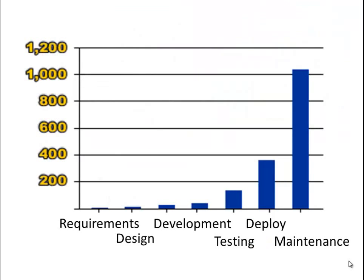Here's a chart which shows the cost of fixing requirements errors in a project. As you can see, it's relatively easy to fix requirements errors early in the project, and a lot more expensive to fix them later in the project.